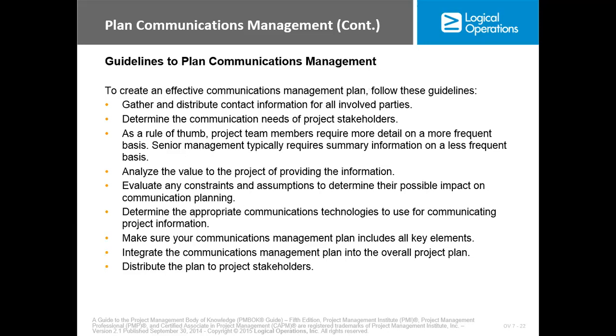Okay, gather and distribute contact information for all the involved parties. Determine the communication needs of the project stakeholders. As a rule of thumb, project team members require more detail on a more frequent basis. Senior management typically requires summary information on a less frequent basis. Analyze the value to the project of providing the information. Evaluate any constraints and assumptions to determine their possible impact on the communication planning.